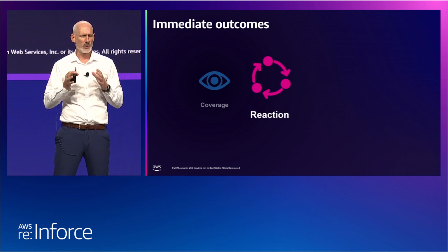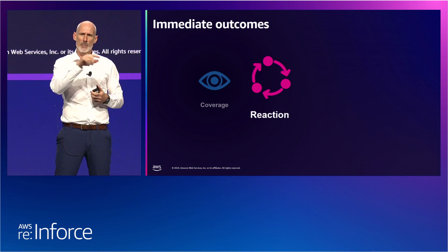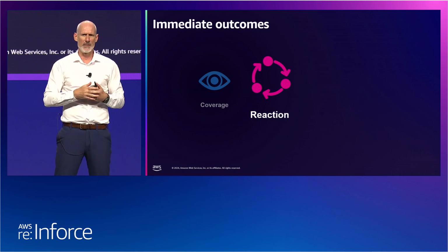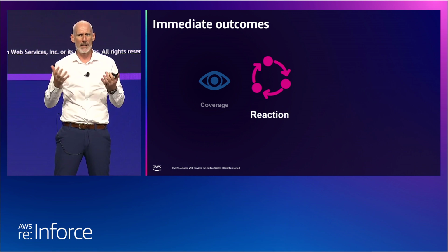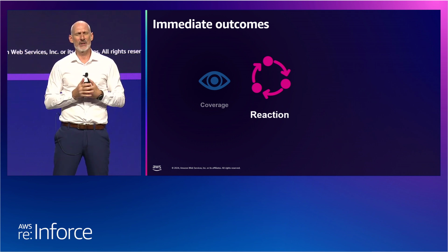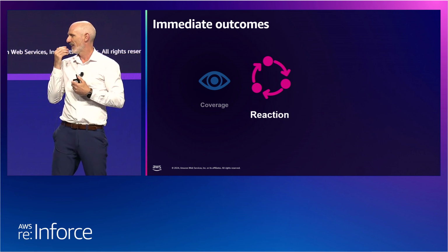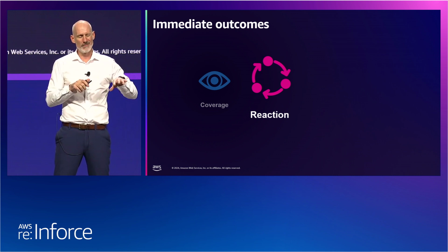The next thing that I saw, which was quite interesting, and one thing I actually didn't talk about, was when we were going through the process of enabling Security Hub and Inspector, we used the estimation tools that are provided by Amazon to try and get an idea of what it was going to cost us in the future. We were quite happy with what that was indicating, but we still weren't sure, so we utilized the trial periods. So I think it's 30 days for Security Hub and 15 days for Inspector, and that gave us an accurate view. But actually at the time we just dipped our toe in the water.